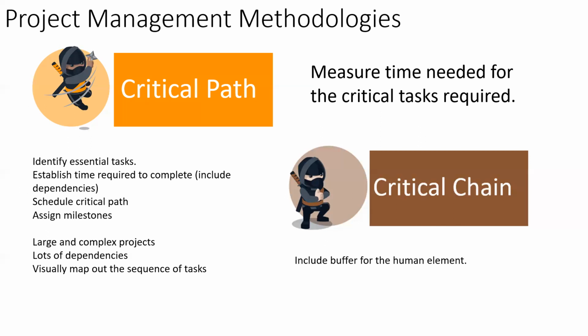So just an important thing, it's not to have a buffer of time for every single task. You could go for milestones. So for milestone 1, there's a lot that can go wrong, we'll add an extra week. Milestone 2, not much can go wrong, we'll just add a day. So it's just including a bit of a buffer. And then obviously, to measure success, if you haven't used your buffer time, that also means that you're on track and good to go.